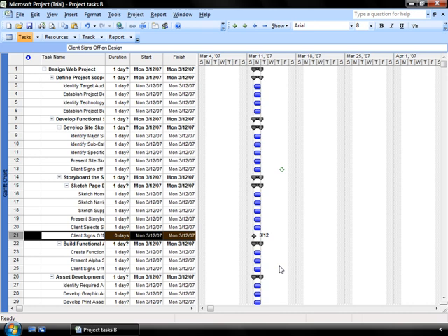Now that you have those two indicators in your Gantt chart, you can mouse over them ever so slightly to see the information that quickly flashes up on your screen, the information that's identified underneath the indicator, so that you can see what you're doing with that. If the task finishes after a deadline, as you see here, the symbol is going to stay. If it finishes before the deadline, that symbol will disappear. These do not affect the project schedule, but they're going to be available when we are calculating the slack that we may have in our project so that we can see if we're going to meet our critical dates or not.